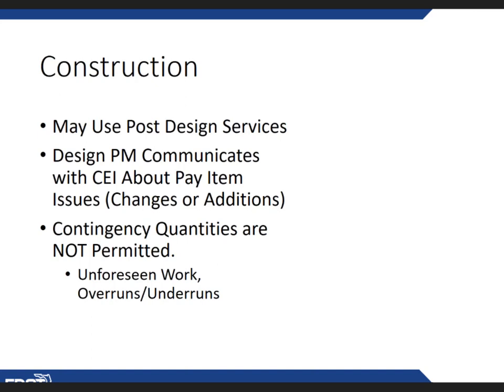And we had somebody say, well, this one doesn't have federal funds. Every project has to be designed according to our approved standards and approved specifications, because there are situations where a project may become federalized. It may receive federal funds later in the process, even after it has been awarded, that there may be federal funds applied behind the scenes. But we cannot allow for any contingency situations.